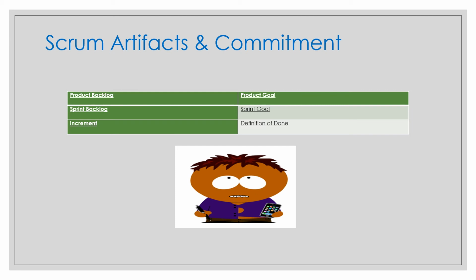If the definition of done for an increment is part of a standard of the organization, then all Scrum teams must follow it as a minimum. If it is not an organizational standard, then the Scrum team must create a definition of done appropriate for the product, the entire Scrum team, right? And the developers are required to conform to the definition of done.